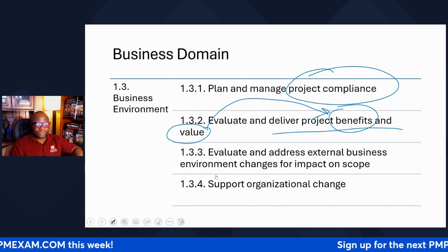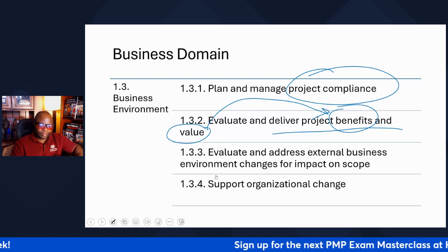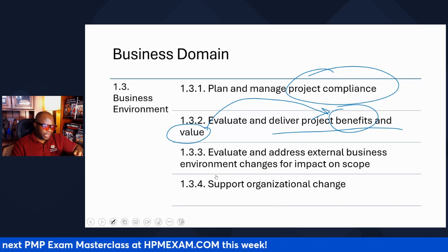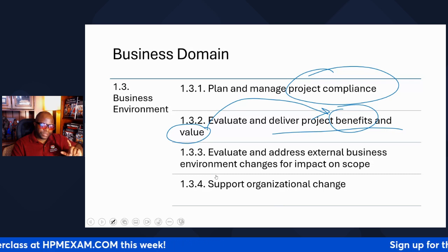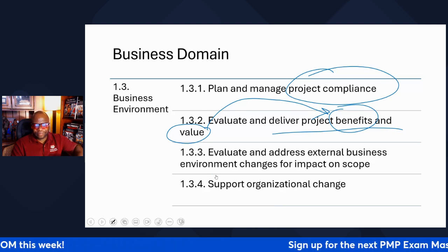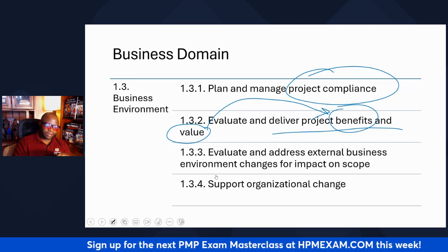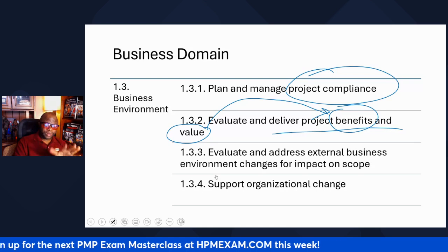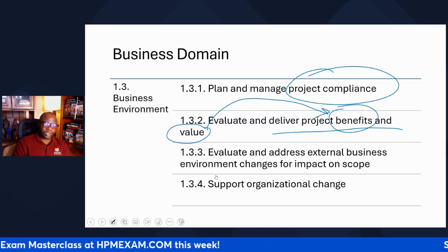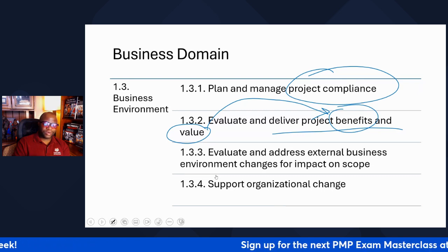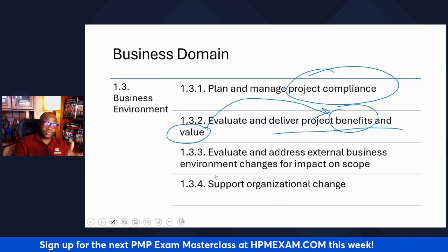Let's go on to page 33. Page 33 has a very important document in PMI's world, and not too many of these project management bodies talk about it, but PMI did a good job in bringing it to the surface. It's called Benefits Management Plan. Because in a lot of projects, you do the project and everyone goes their separate way and they forget about the benefits. Honestly, in a lot of projects, the benefits are not realized. So imagine spending millions and millions of dollars on a project where the benefits were never really realized because you didn't chase them down and there was no one policing it. And that's where benefits management comes in.